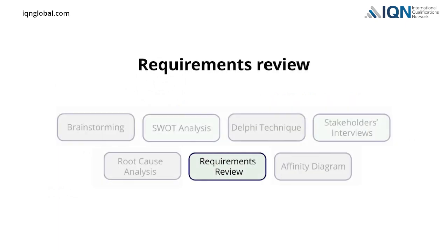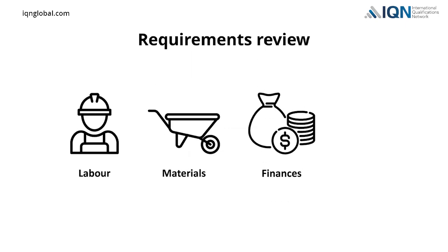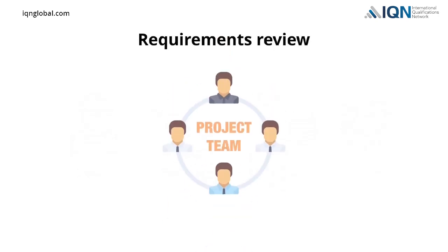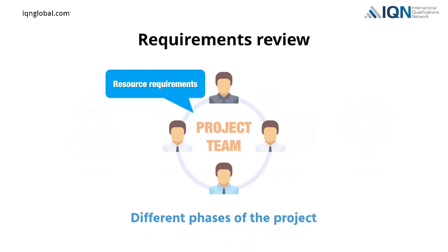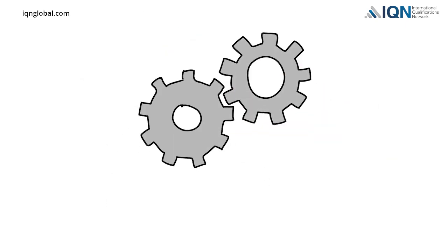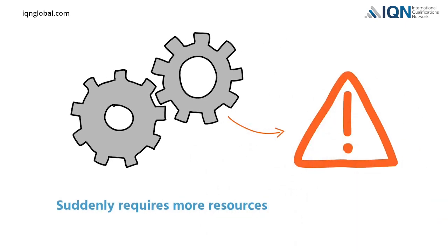Requirements review is the review of a project's labor, materials, financial, and other resource requirements. Requirements review allows the project team to analyze resource requirements at different phases of the project and identify potential risks quickly. If a process or task within a project suddenly requires more resources than usual, it is a possible sign of the presence of a risk.